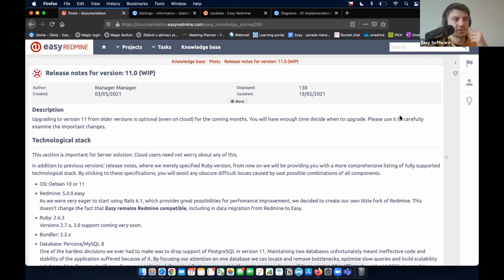And is it going to be possible to push or plan tasks beyond the date of the associated milestone? Setting up the due date of the task behind the date of the milestone is possible. It depends on the checkbox which is in the global configuration for the application.